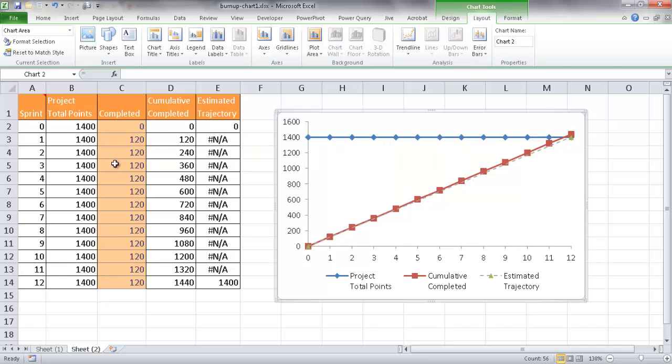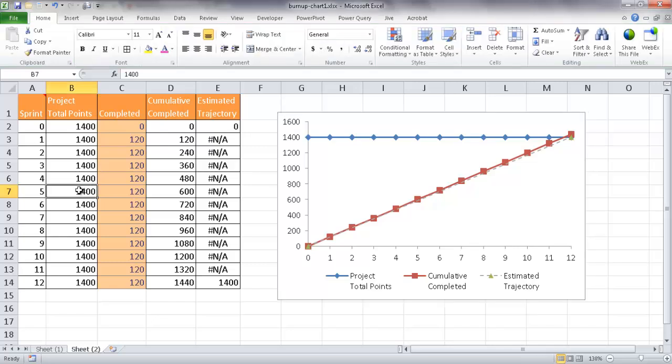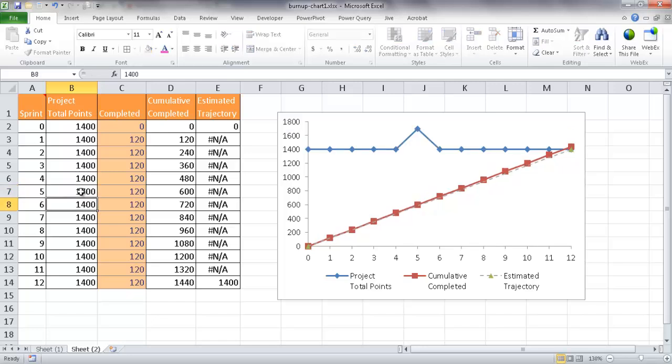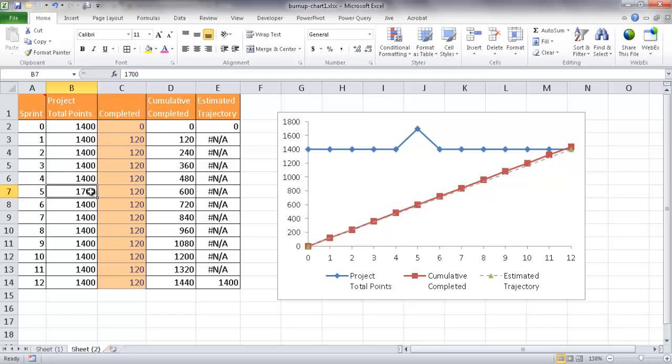Maybe the stakeholder has indicated that another feature wants to get put in. Maybe in the middle of the project, we have increased some scope. There's additional requirements in it. And the total units needed to complete that project are going to go up. So maybe at that point, it's become 1,700. And then, of course, it becomes 1,700 for the rest of the project after that because of the additional requirement that was put in.